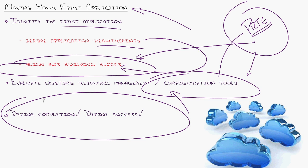Big one: define completion. Define success. Before you ever move file number one, identify what it looks like to be successful. Scope creep becomes a major problem — you start moving this first application and you go, 'Oh wait, it relies on such and such, we've got to move that too.' And before long you're moving everything, not realizing where the end of this road is, and even when you do have everything moved, it's not optimized the right way. So make it clean. Create a project plan. Define what the end of this move looks like.